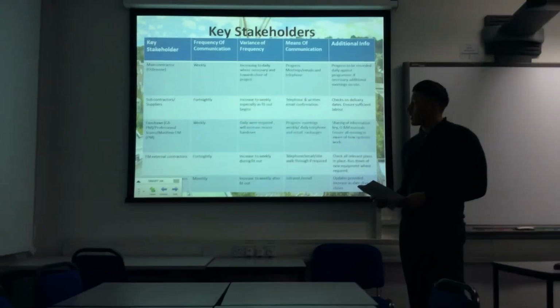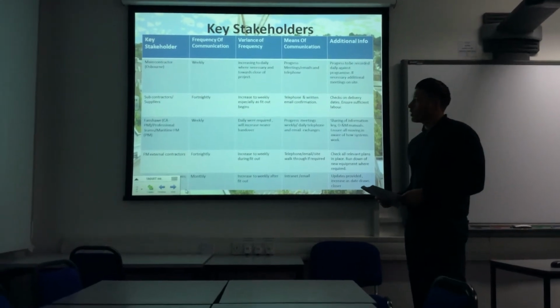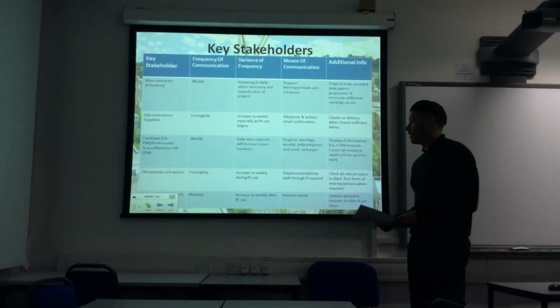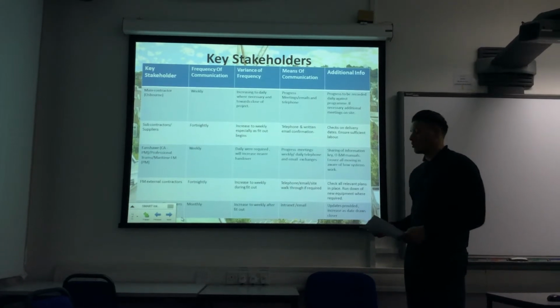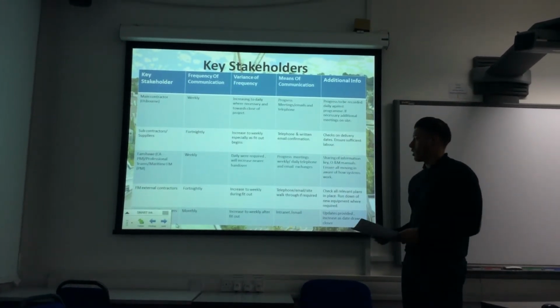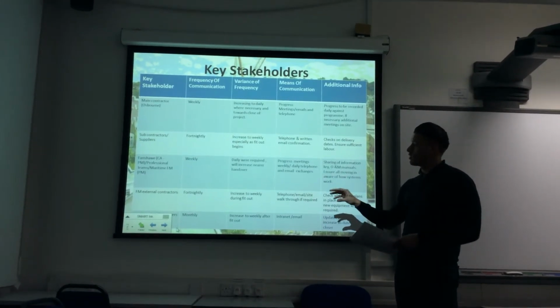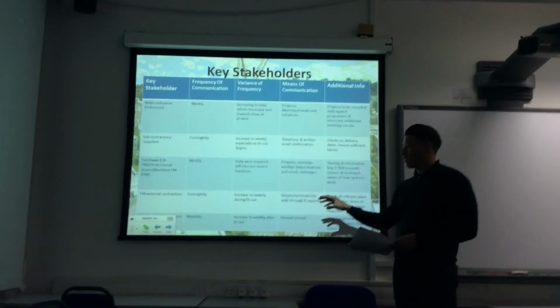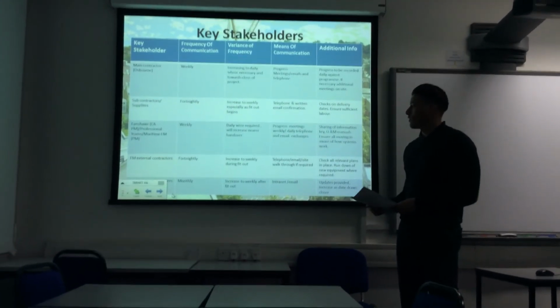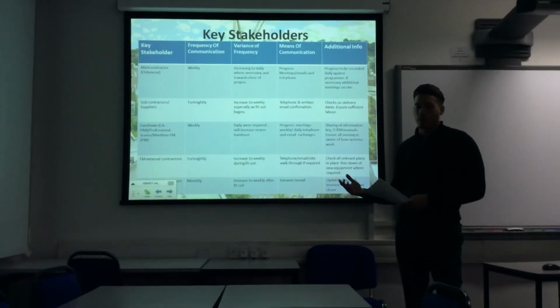Also, we have, as mentioned before, though not as a key member, the FM external contractors. These are those, as we already mentioned, caterers, maintenance, security. They would probably need to be contacted again towards the end, as the construction project comes to an end and we're looking at handover. The reason for this is because they need to make their plans as well.